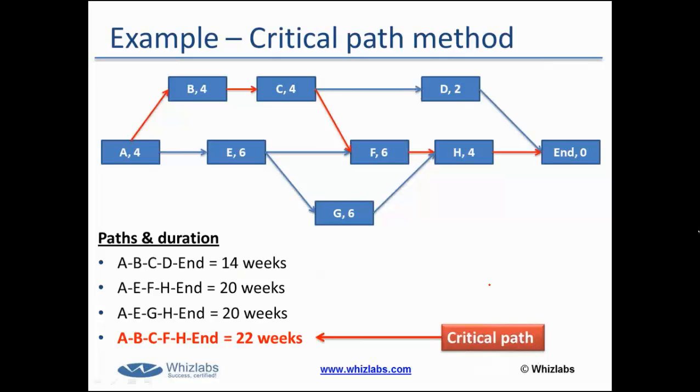One more thing that I wanted to say is on the same question that is raised by Ramesh. Yes, if you have multiple critical paths in a project schedule, that means you have to monitor more than one schedule at a time, more than one path at a time. So that would actually increase the risk of your project.